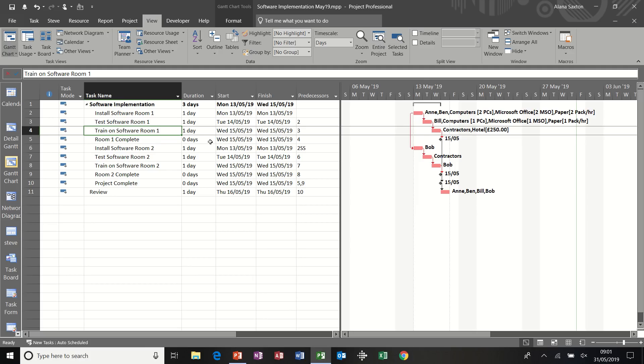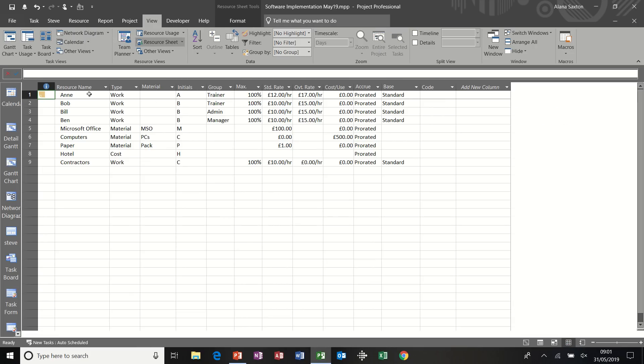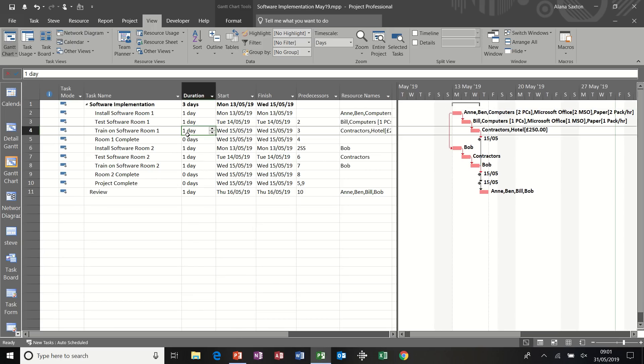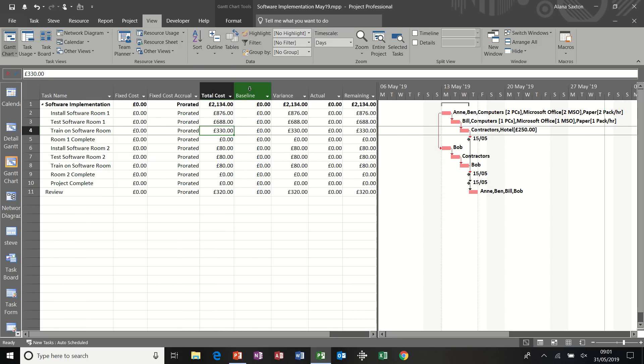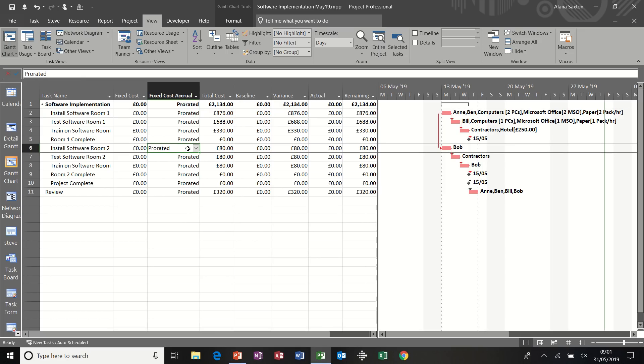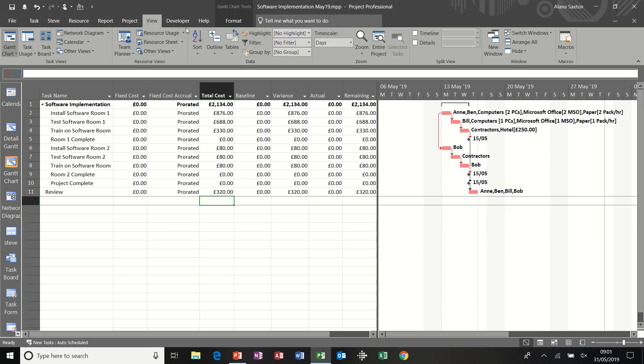So first of all, just to recap where we are with this project, here's our task list and here is our resource list. Most of these resources have been added and allocated to these tasks. What I'm going to do is change this table to the cost table so that we can see the cost of this project, which is £2,134 at the moment. The baseline column is blank. We're ready to save our baseline so that column will shortly be populated.